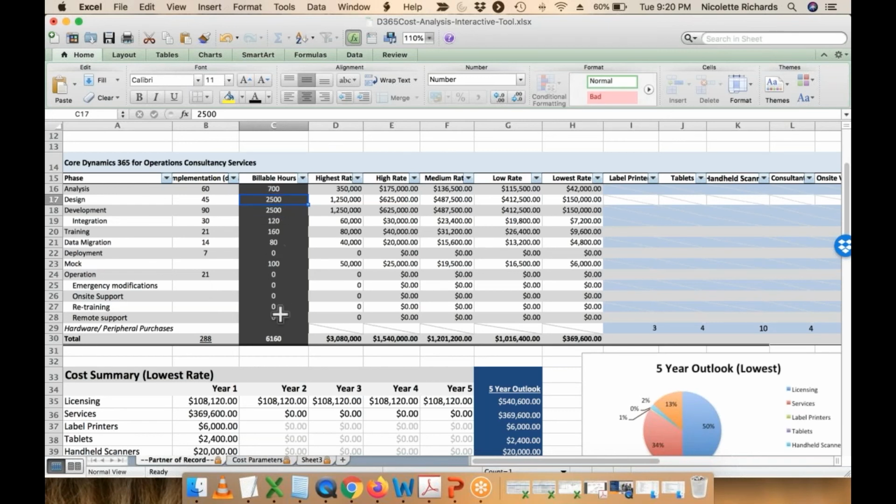If you set a goal to implement within 12 months and the project keeps getting extended and pushed back because we don't have the right people showing up to meetings, we don't have people making decisions, we don't have people championing the project, or we're constantly moving dates, that has a direct impact on the actual pocketbook. You're going to spend a lot more, and I don't think it's right. I think there are a number of ways you can plan around that and address that.